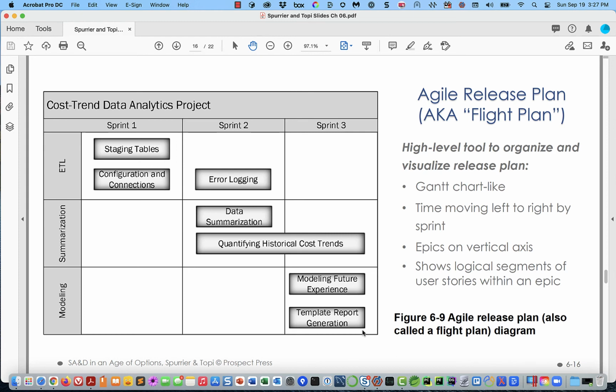The way that we're going to go at the sprints is not random, right? At the end of every sprint, we are going to say what are the most important things for us to work on. But here's what we think will come out of that analysis. We think we're going to do these things in sprint 1. We think we're going to do this in sprint 2. We think we're going to do these things in sprint 3, right? Here's when we think you're going to get things.